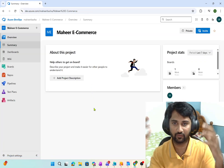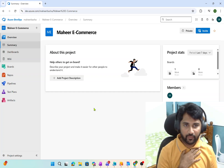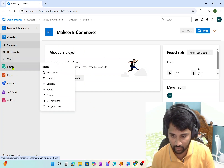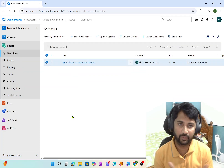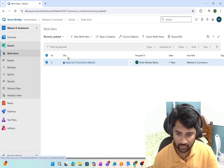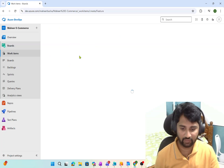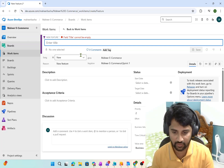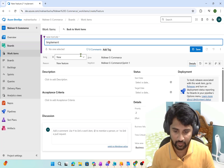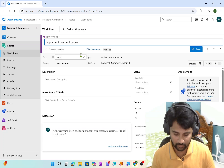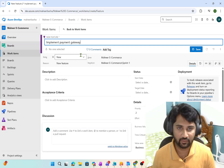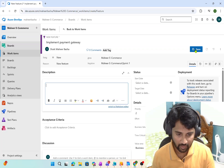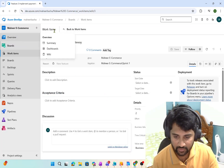Epic is the top parent level. Inside the Epic you will have a Feature item. A Feature item is a major capability or a big task you want to achieve. Going to Boards → Work Items, I will create a new item and select Feature. Maybe implementing a payment gateway is one of the major tasks for that e-commerce website, so I'll write 'Implement payment gateway'. I can assign it to somebody and write a description. Now I'll save it. The Feature item is saved.